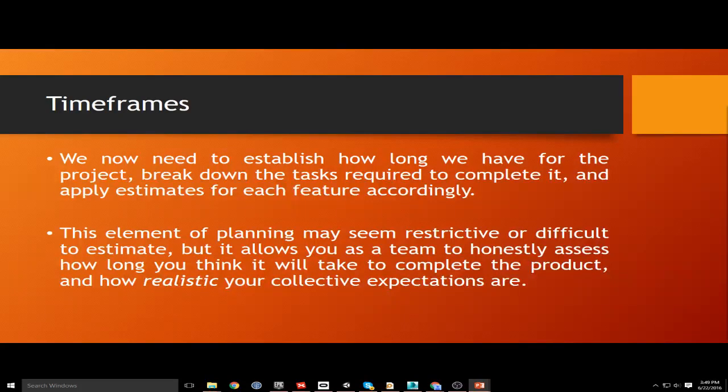That's half true. That's not something I suggest everybody do. You want to be realistic in your expectations, but everybody should be aware that you want to build a little bit of a buffer in there for things that might go wrong, and things that might crop up that delay stuff, or an aspect of that problem that people didn't really expect when you started out. So being realistic is important.